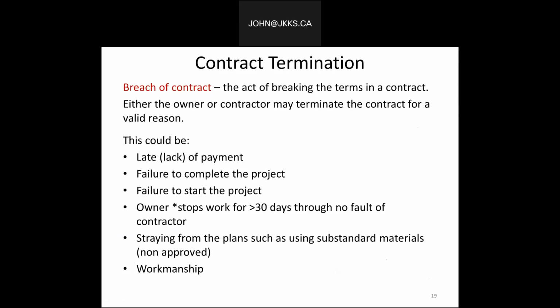or actually it's more than 30 days through no fault of the contractor, straying from the plan such as using substandard materials or non-approved materials, and certainly issues related to workmanship. Again, all these things are often dictated in the terms of agreement and the contract documents. So again, hopefully nobody enters into this situation where we have termination or breach of contract.